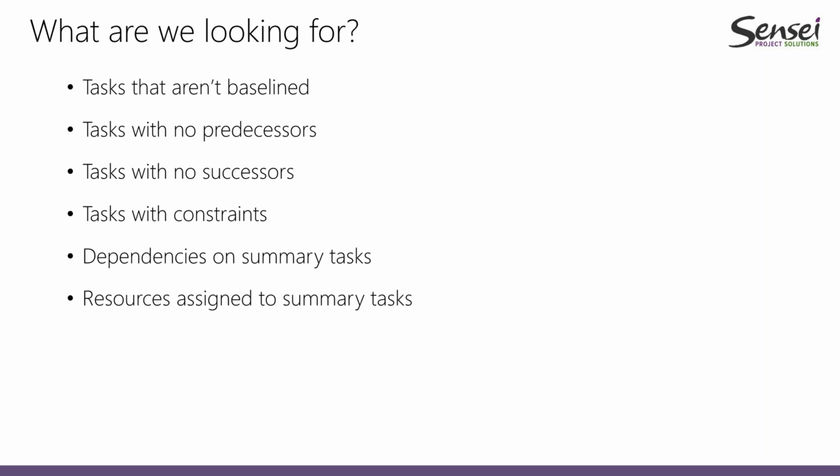And finally, the last point in here is having resources assigned to summary tasks. As I said, a summary task is not something that we are doing regularly. This is not something that happens. What happens is a task, because it's an activity, but the summary tasks do not exist. They are just grouping a collection of tasks into a package or a deliverable. So we also have to avoid having resources assigned to summary tasks.